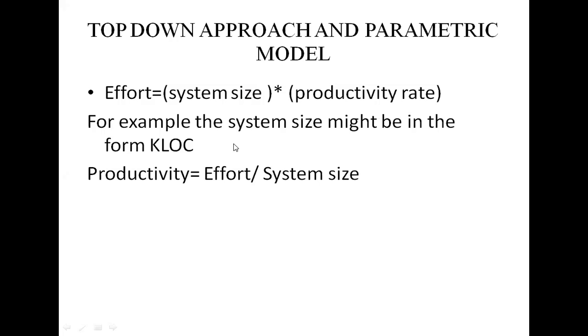Another person who is less experienced would need 55 days per KLOC. So that is 2 times 55, which equals 110 days to complete that task.